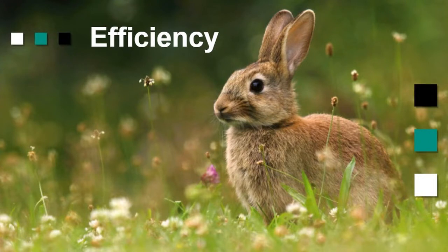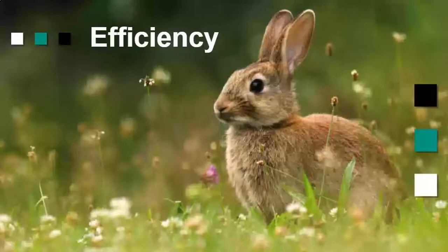So it's more efficient if we have it more automated and we've got a control mechanism to make sure that everything's been done. If not everyone's done their updates, if not everyone's moved the data date, you start to get inconsistencies in the way the data is reported out. So we've got tools that help automate those steps to make it more efficient.